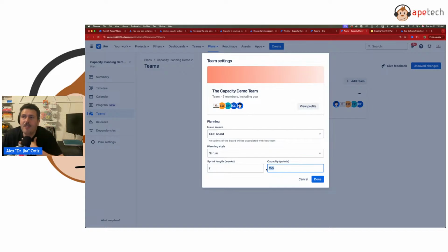And so I would say for a traditional Scrum team, I'm just throwing numbers in the wind here, but historically my teams have usually done about 20 to 25 points, which usually means a full sprint workload, and I usually have anywhere between 7 to 10 members, right? So you can kind of do some math. So any number between 100 to 150, I think, is going to be enough. In this particular case, we have 5 people on the team.